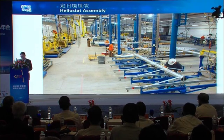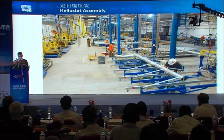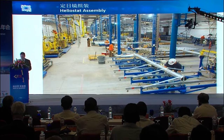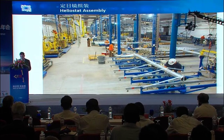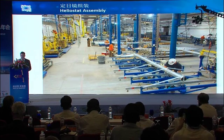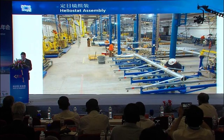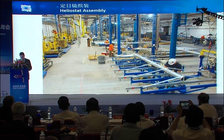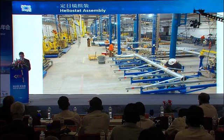The team used mock-up assembly testing facility to conduct time and motion studies. And the results of these studies enabled us to redesign the building to efficiencies that would enable them to produce 500 heliostats per day, or 1.7 heliostats per minute. It also led us to separate the building into 2 distinct areas, one smaller building for the bonding and pre-assembly, and then the larger building that you see here.